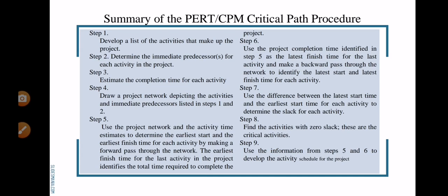So in step 7, use the difference between the latest start time and the earliest start time for each activity to determine the slack for each activity. So in step 7, we determine the slack or the length of time that an activity can be delayed.